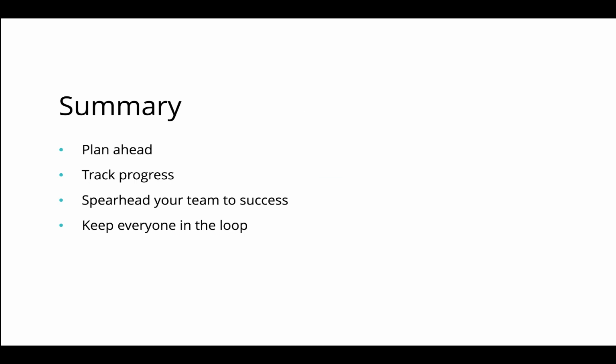To summarize, let me give you a quick rundown of all the points discussed in this session. Plan ahead. Before you chalk out a plan for your IT projects, look back at your previous projects and identify underlying issues that might have delayed those projects. Look for details like specific issues or categories that took longer to complete, technicians who repeatedly delivered late, etc. And use these findings to plan your future projects and be prepared for obstacles by including buffer time or additional